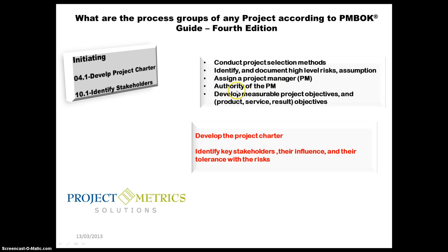You define the authority of the project manager. You will develop measurable project objectives and product, service, or result objectives, and you will identify the stakeholders, their influence, and their tolerance for risk, and you perform analysis to gain buy-in and the requirements for the success of the project.